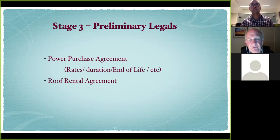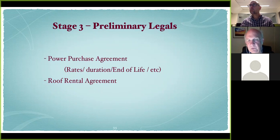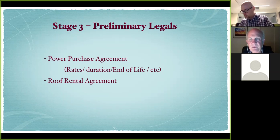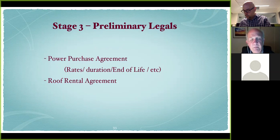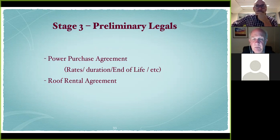For preliminary legals, there are basically two documents. First, a power purchase agreement — currently about 10 to 12 pages with a schedule at the back covering who's involved, the rates, duration, and how to deal with end of life. Second, a roof rental agreement — whoever hosts the panels agrees to give right of access to get up on the roof and remove panels if there's a dispute. The two documents cross-reference each other, but they may be with different parties — for instance, the power purchase agreement might be with the building occupant while the roof rental agreement is with the building owner.